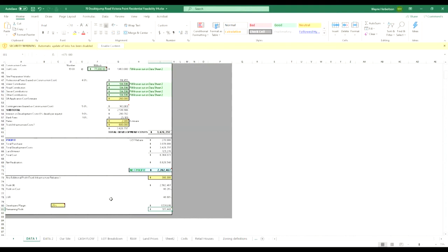And we do this in one go. We would, because it's so small a development, it's only 19 blocks. We don't have staging here, so it's not a complicated development. And so we just develop the whole thing in one go and do the whole 19 lots in one go. That's my advice. And that way you can save a bit of money. That way you don't have to bring contractors backwards and forwards, because they charge you staging costs then to take them away and bring them back. Yeah, so this one's a nice little one.